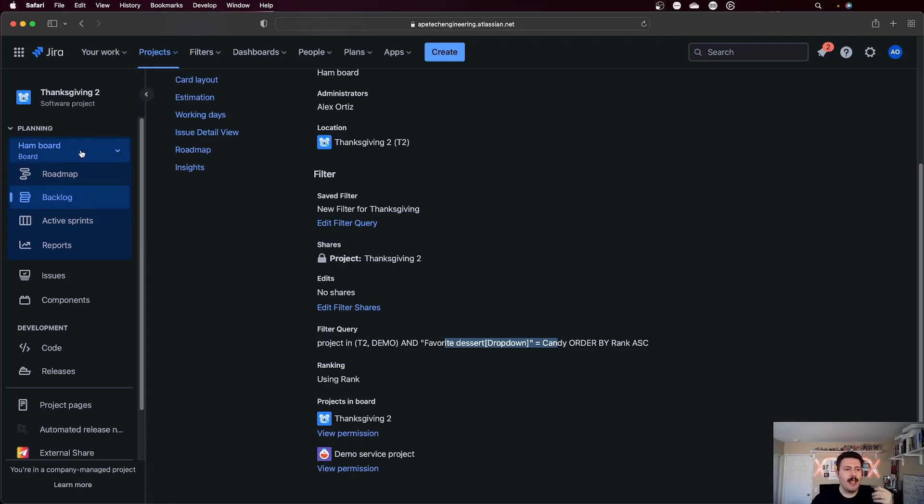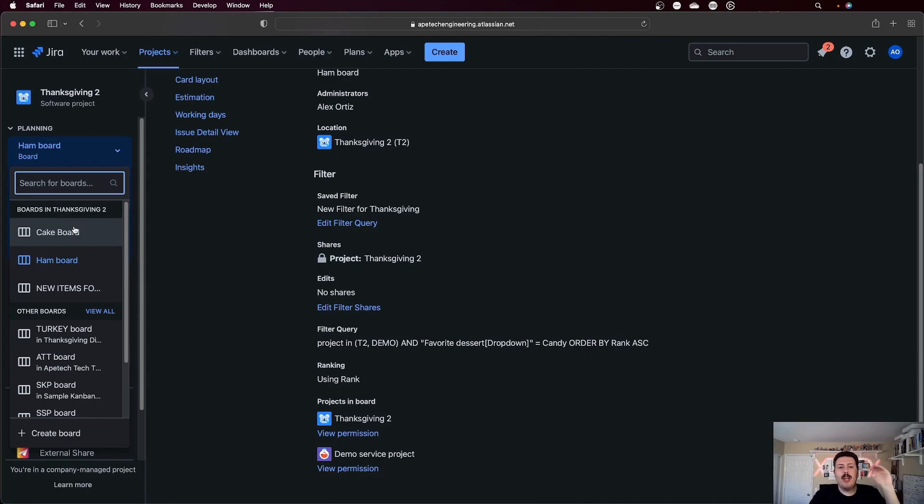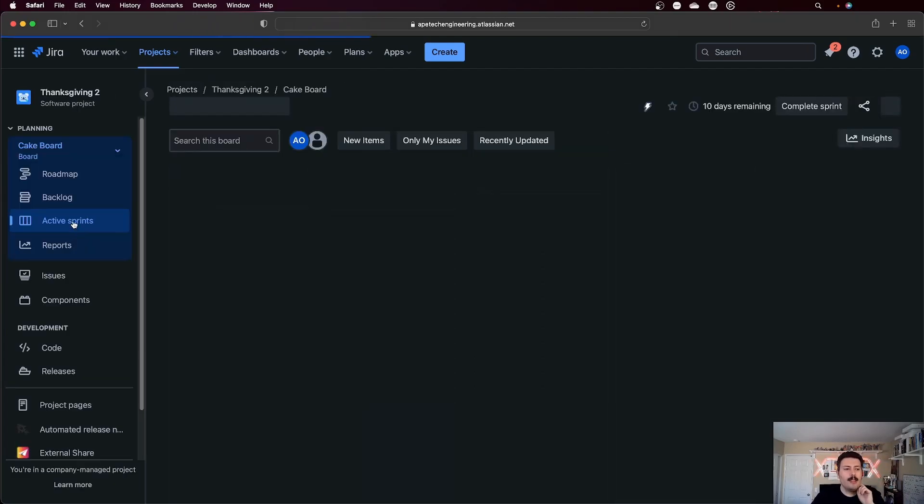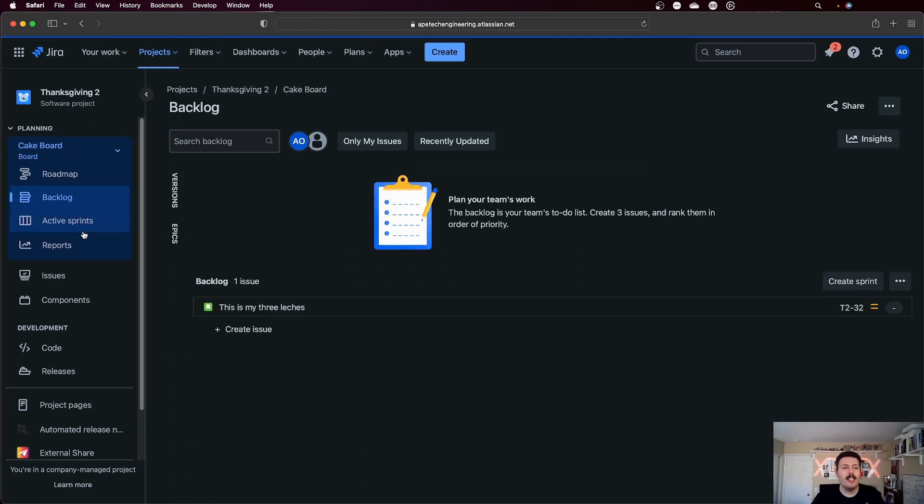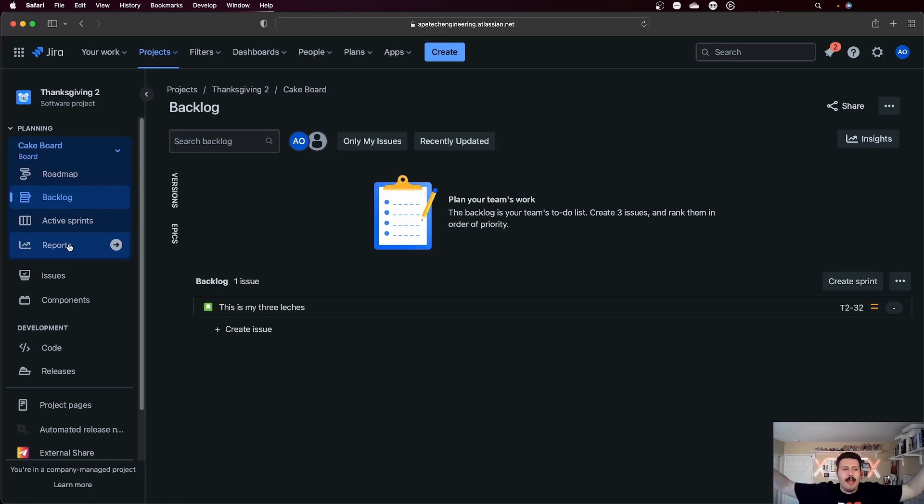But the ham board or the candy board, the cake board, they're all going to live here. And I can now toggle between them all. And each one of them has their own backlog. Each one of them has their own sprint. Each one of them has their own reports. And so now I can independently still manage my teams, but only be inside of my Thanksgiving 2 project without having to go to different projects.